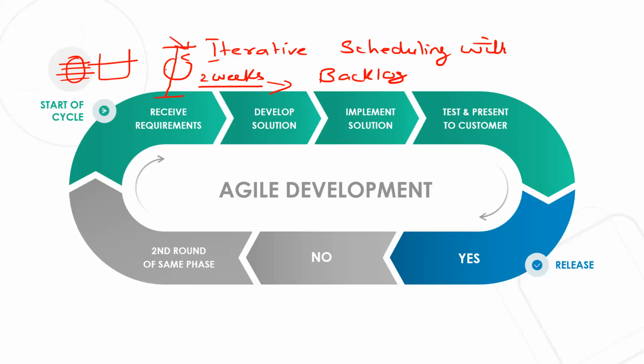Otherwise, this sprint will not be terminated or finished. So this will continue, whatever the size is, it will remain the same. As I said, no work is added, no changes are added. It can only be added at the end of the review meeting. If something is bigger than that, then the product owner can terminate the sprint.